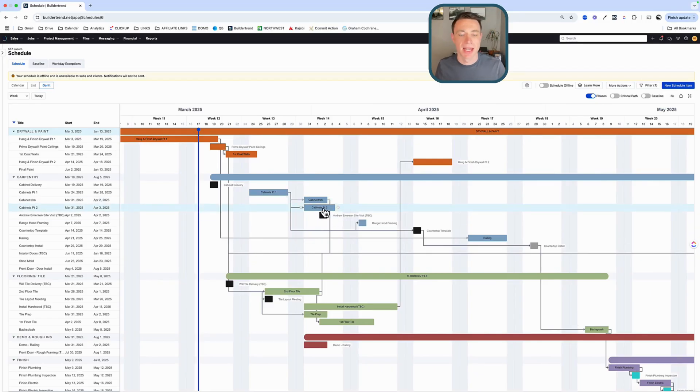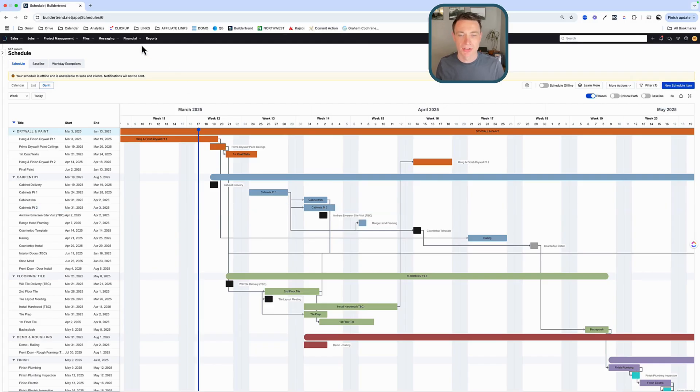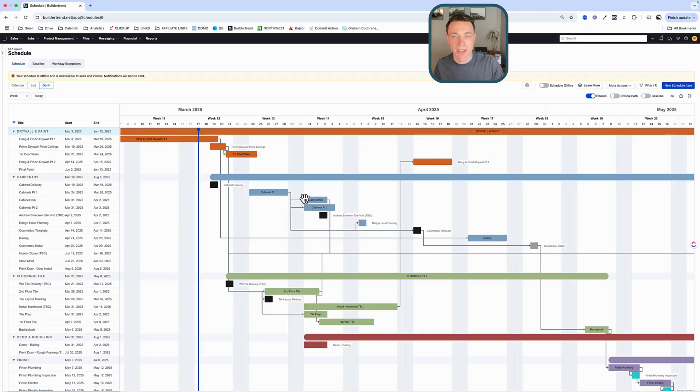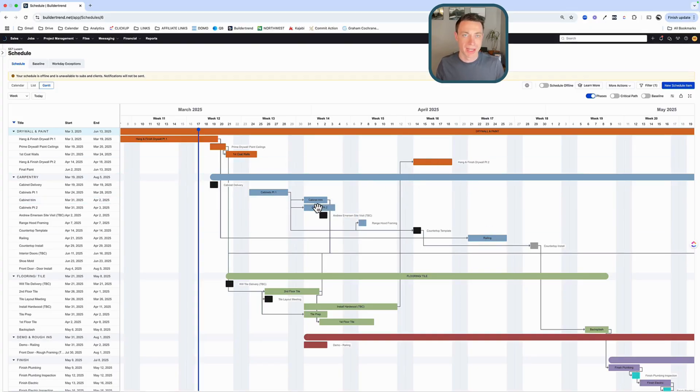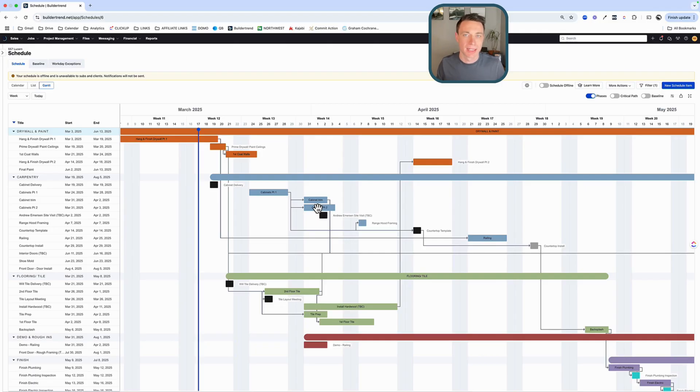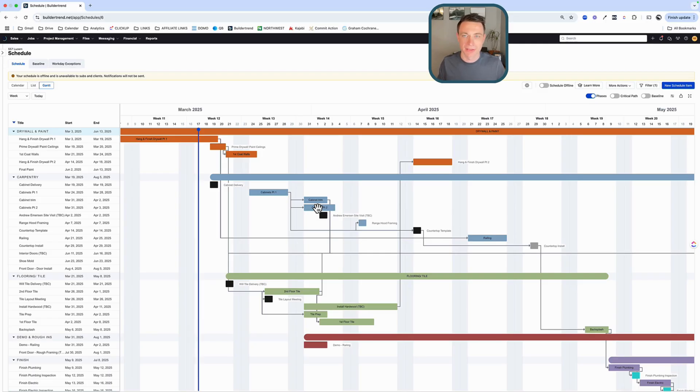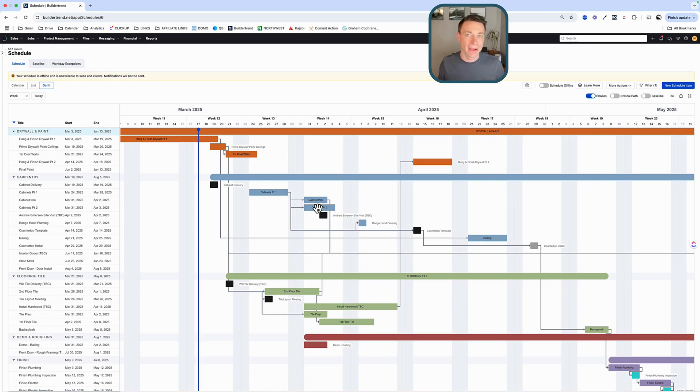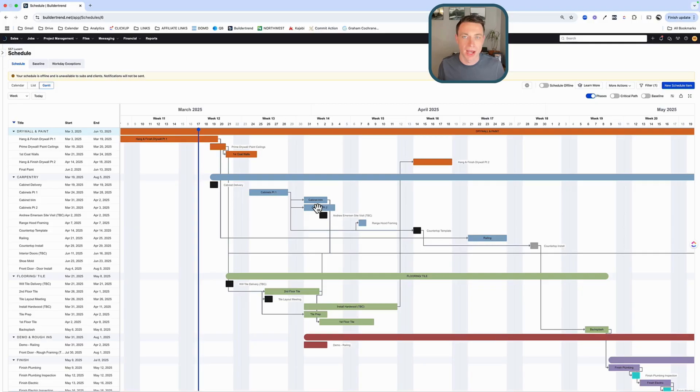Now I don't really work in here. That's not really helpful for me to kind of do my work. But if I go back into week then and open these up, now I can see and click and move around. And as we talked about in our schedule, the key to this is that there's so many things that are linked to this as well. So we can link our financials to this. A bill is due when an item here is complete. An invoice is due when an item here is complete. We can build that out. But I don't want to work on that stuff until I feel really strongly about my schedule.